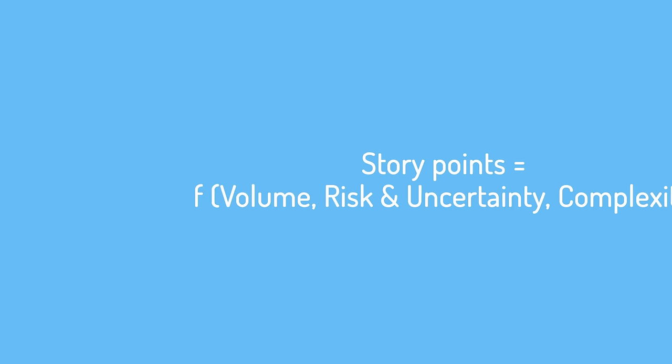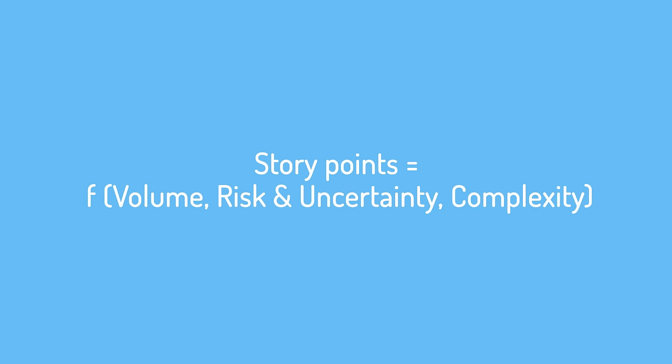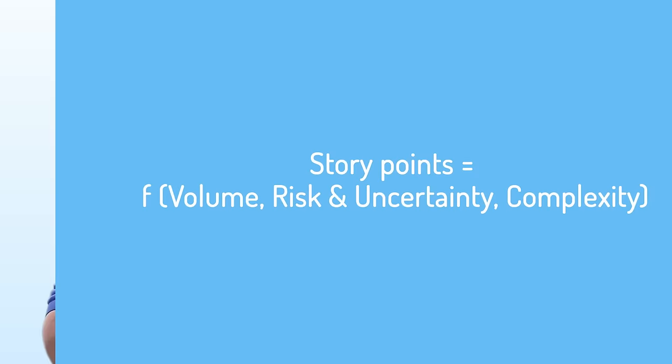Story points are also a function of the complexity of the work to be done. Work that is complex will require more thinking, may require more trial and error experimentation, perhaps more back and forth with a customer, may take longer to validate, and may need more time to correct mistakes — so complex work is given a larger estimate. Each of these factors — volume of work, risk, uncertainty, and complexity — is combined based on the impact each has on the likely effort to complete a product backlog item.